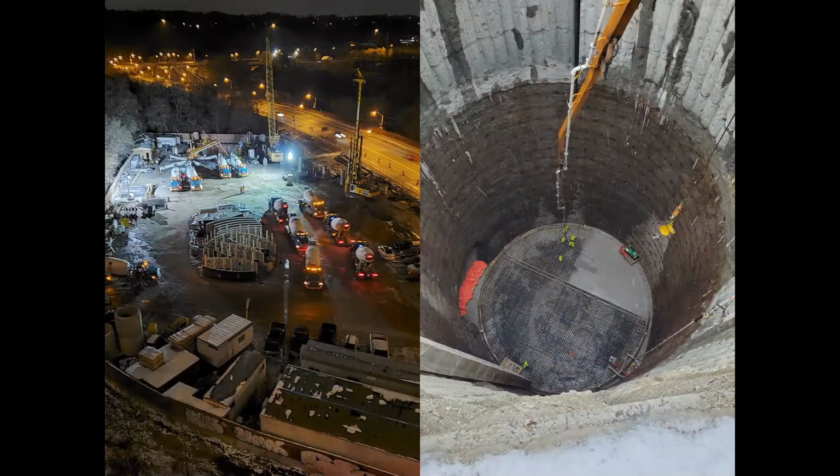For BB1, the continuous base slab pour took place on November 18th, 2019. It started at 3:30 in the morning and ended at 6:30 in the afternoon. The contractor, North Toronto Constructors, NTC, used one stationary pump and one mobile pump. And they used 860 cubic meters of mass concrete, which is about 95 concrete trucks.